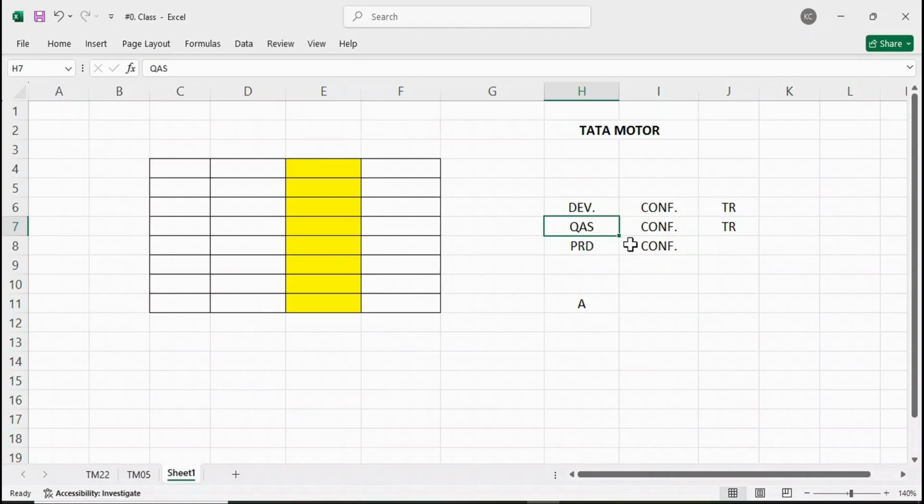It is taking, let's suppose, 2 days. In 2 days, we have completed the entire migrations. Then we get the idea that yes, within 2 days we can complete the entire data migrations, or within 3 days we can complete the entire data migrations. So what will happen? Then we have to move for the final cutover, right? And for these 2 days or 3 days, we can lock the legacy system.